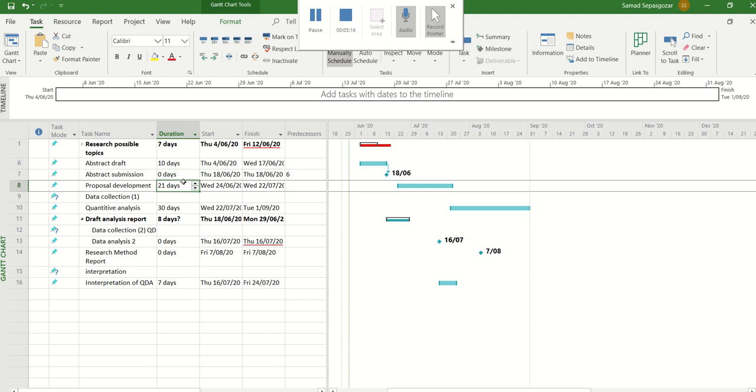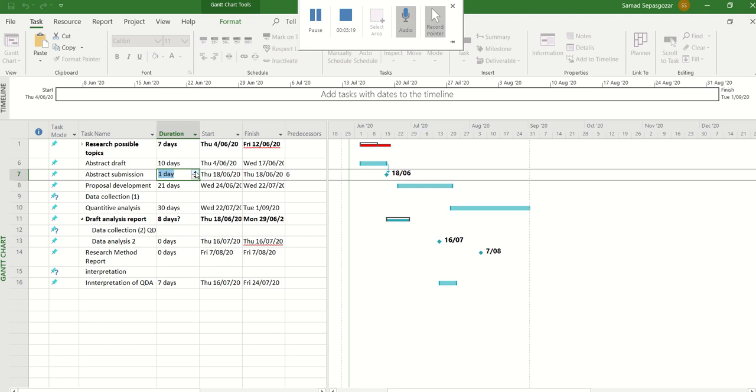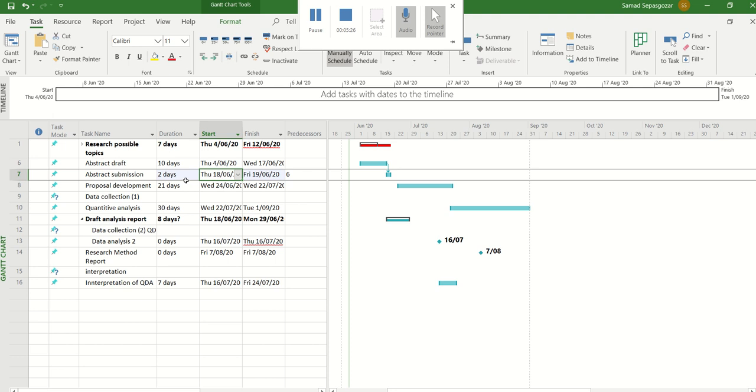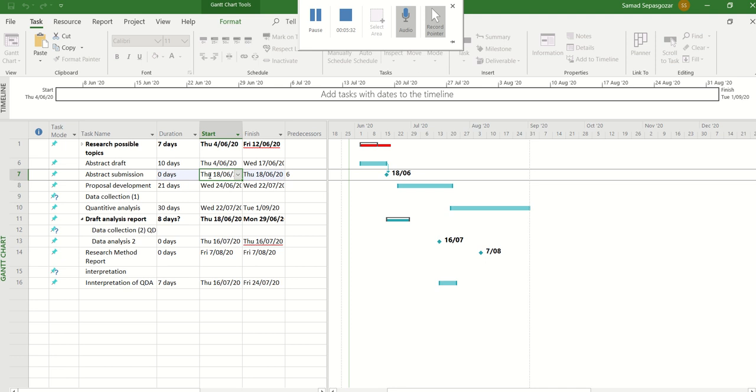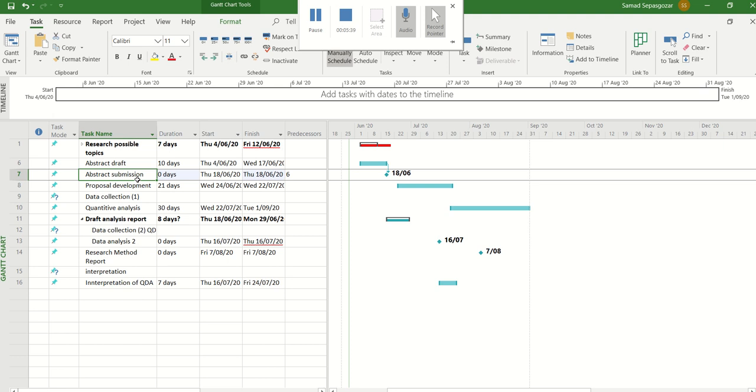Actually here, then you have a bar here. You can see the bar here. But if you say the duration should be zero, then you turn actually this activity to a milestone. And then you need to make a decision. This milestone is linked to what activity, what activity or what kind of activities or series of activities should be done before this milestone.